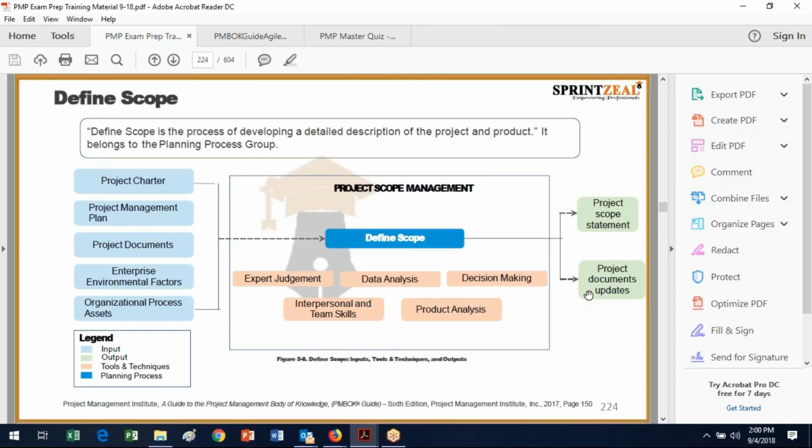So say in the analysis of whether or not we should make the design change, the cost of all these things and the schedule ramifications and the personnel needs all need to play into whether we are going to make this change. But this gives you a very forthright manner in which to trace all of the impacts throughout the project. So if you do your requirements traceability matrix well enough, you should be able to do your tracing very well.